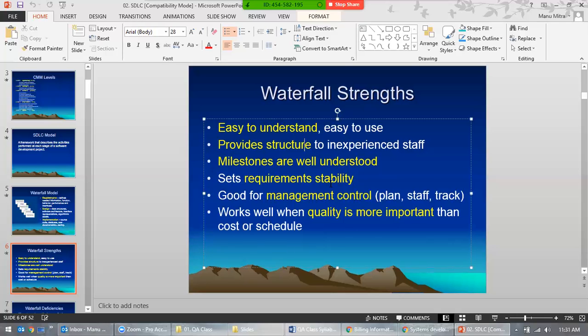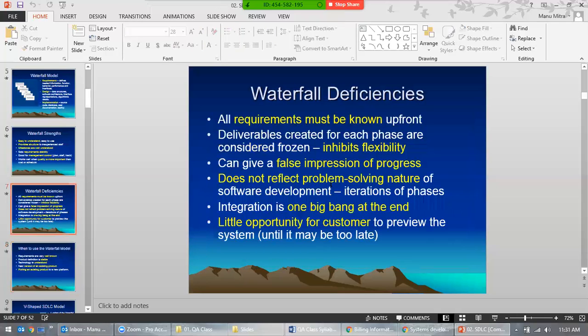Okay, so it has disadvantages too. One of the disadvantages of the waterfall methodology is that it takes too long. Let's say it's a 6 month project, a lot of things are happening, and because of issues it got prolonged, and now it's taking 8 months. Now the client doesn't want to wait that much time, because 8 months is pretty long. So that's the reason they move to agile.